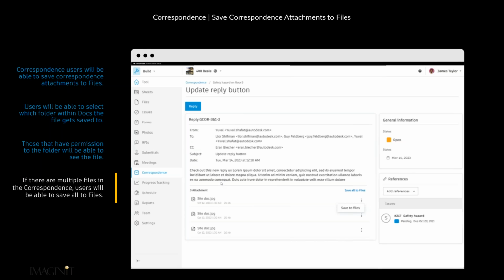One thing that we've worked with a lot of construction administration clients on recently, when you're working with GCs that are forwarding documents to you via email and email attachments, if we forward those to our projects, say it's an incoming RFI request from the GC or an incoming submittal request from the GC, it's really nice. You could set up your folders in the project to have just a folder called incoming submittals, and you can save those attachments directly to that folder location in the project.